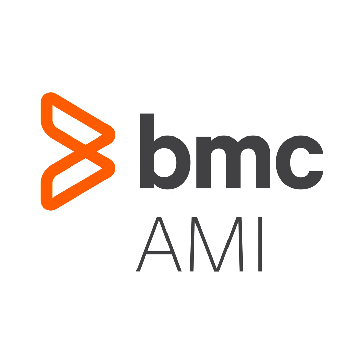And the other thing is, if you look at the way applications are constructed today, it's not just a mainframe-only application. Oftentimes there's a distributed component to the mainframe application. And so when you're trying to put new enhancements out to that application, the mainframe team and the distributed team have to work hand in hand to deliver those enhancements often. And if the distributed team is going much faster, or even using DevOps and Agile to develop their code, and the mainframe isn't, it's using waterfall, you can really only go as fast as the slowest team. So the distributed team could push out as much as it can, but if the mainframe team isn't pushing out at the same rate, you're definitely going to slow down.